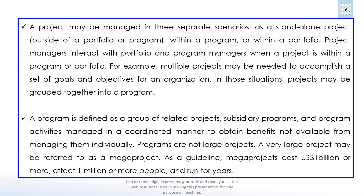You have a greenfield land, and in that greenfield land you will have to create basic infrastructure. The ground where you are going to build the township should be leveled and made plain. It should have roads, street lights, water supply, sewage connection, and electricity connection. Once you bring all these things as infrastructure, then you can think of constructing buildings.